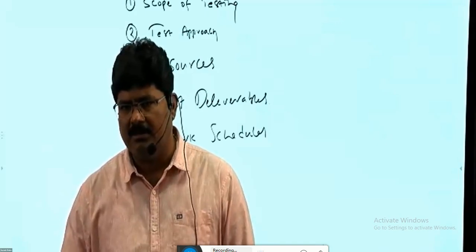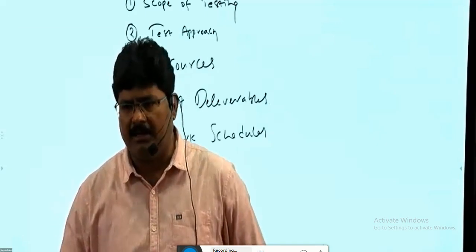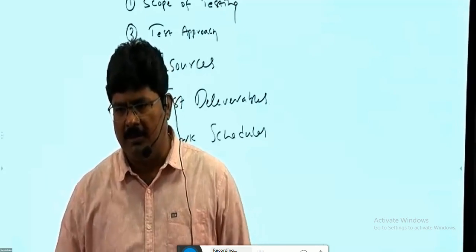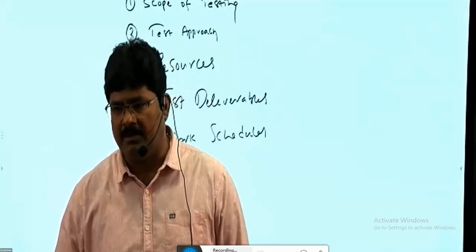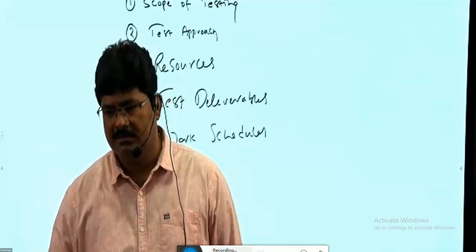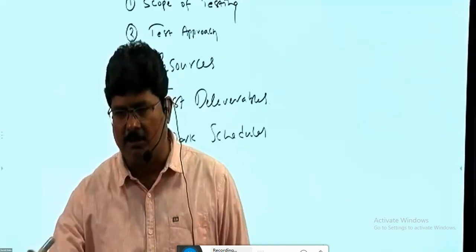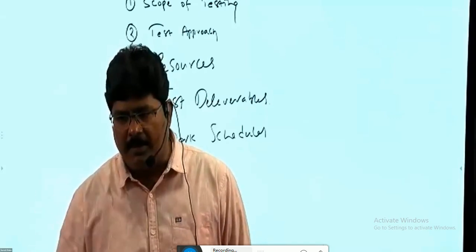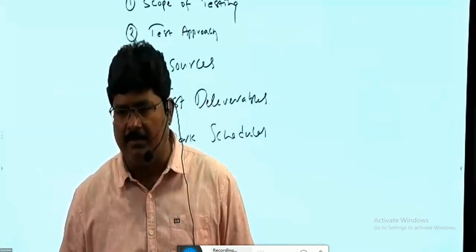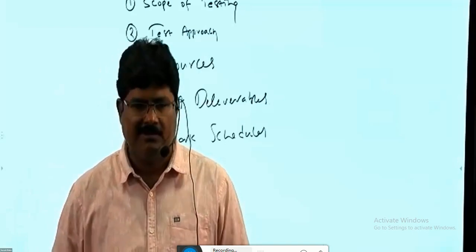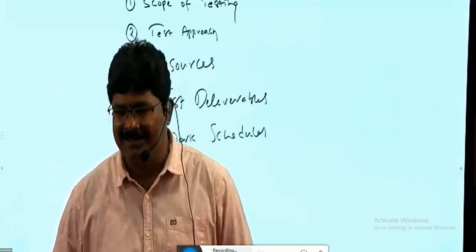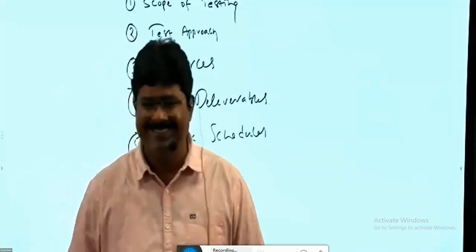Let's say you gave a contract to a contractor for constructing your home. If you say after completion of my home I'll give a payment. Once the basement is done, you have to make the payment for that. If you make the payment, then only they construct the wall, otherwise they leave the basement and go. Correct? That's why it's about service.